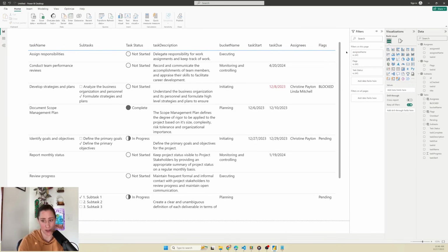So next steps, you have your data in here. You could add a Gantt chart. I have another video on how to use the free Microsoft Gantt chart visual. You also want to remember to schedule refresh on the JSON file in Power BI after you've published it. So you need to publish this first, then schedule refresh on the SharePoint source for the file. That will 100% automate the updates to all of this between this and the schedule on the Power Automate flow.